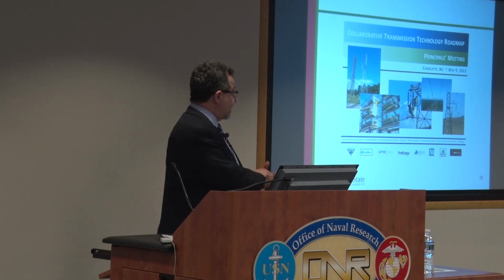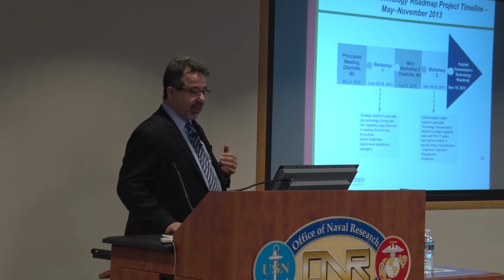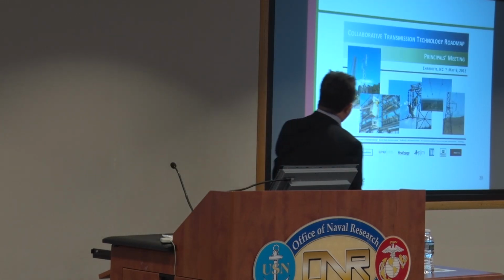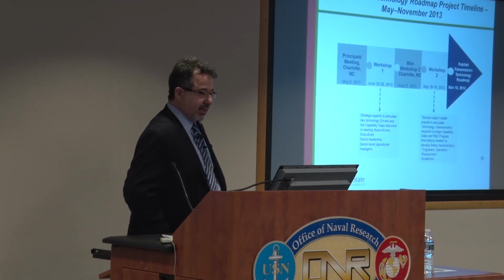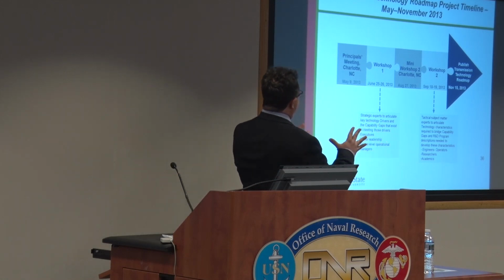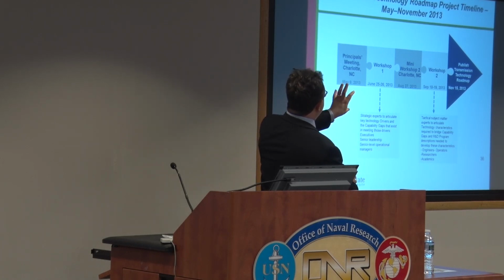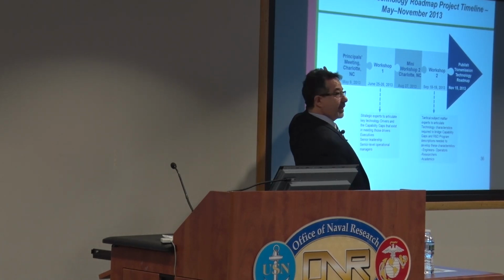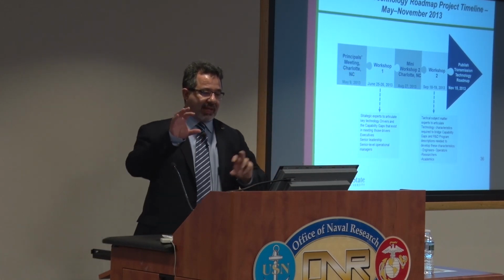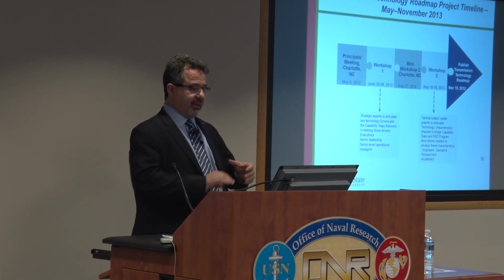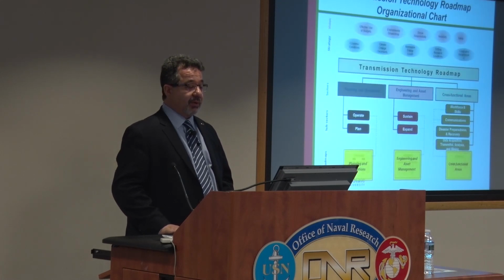Later on, then, what we did in the BPA was diffused into the whole country. We worked with utilities all around the country to develop a collaborative transmission technology roadmap. We, at this time, really had a focused process which we started repeating, which really focused on having an executive meeting first to help you prioritize, and then specific workshops, a strategic and tactical one to identify the capability gaps, and then later on the technology characteristics and R&D programs.